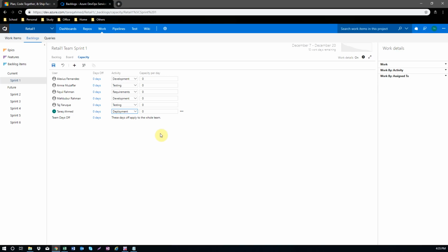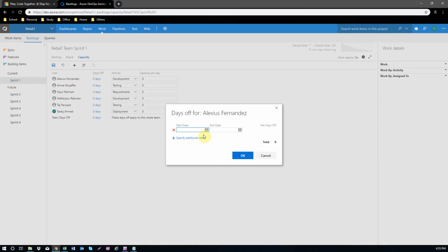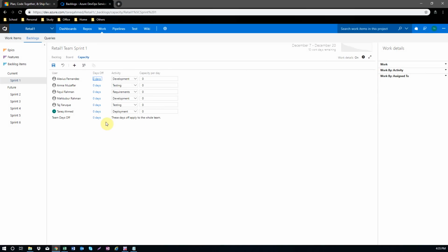Okay, so Alex, if you have any planned day off, then you can mention here which day to which day you are planning to be off. If you put that in, it will be deducted from your working hours. If you have an unplanned day off, obviously you cannot mention it. So mostly in the sprint planning meeting, the scrum master asks, hey, do you have any plan for a day off or not? Capacity per day, how many hours will you work.